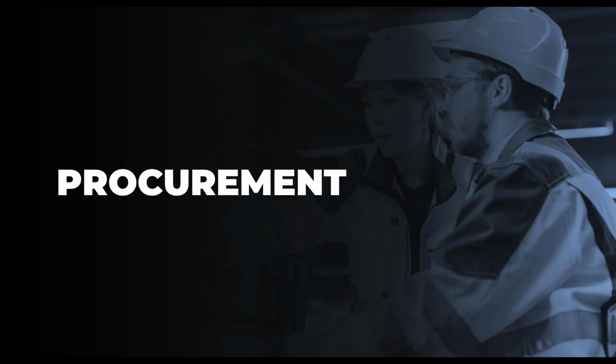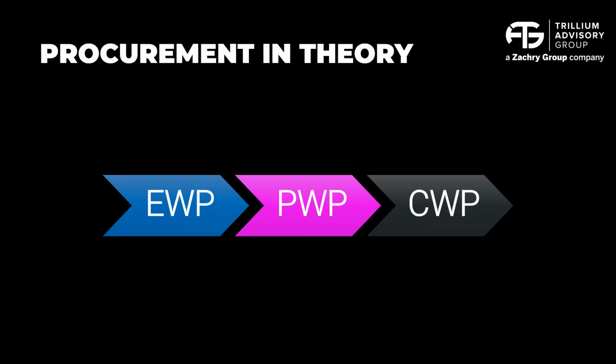All right, so moving on to procurement. Procurement is difficult, and I think there's a lot of consensus in the industry on that. Organizations typically approach procurement quite differently. People have different systems, different processes, and ultimately, getting visibility into what's happening in procurement is the goal, because if procurement is performing well, we're going to see positive impacts on downstream construction activities. And if things are missing or delayed, then we're going to see late starts on our downstream CWPs and ultimately the installation work packages that are subsequent to that.